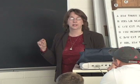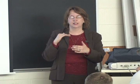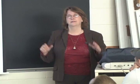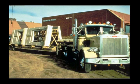So if you have a 1 by 10 foot column cover, that's still going to cost you $1,500. It'll cost you the same $1,500 if you have a 12 foot by 30 foot piece of wall panel. So if you start looking at the square footage cost of putting it on the building, bigger will be less expensive. There you are getting it to the job site. It's kind of unusual to have two pieces of precast, but because they have those big punched out windows in this case, they could do it with the weight of the concrete.